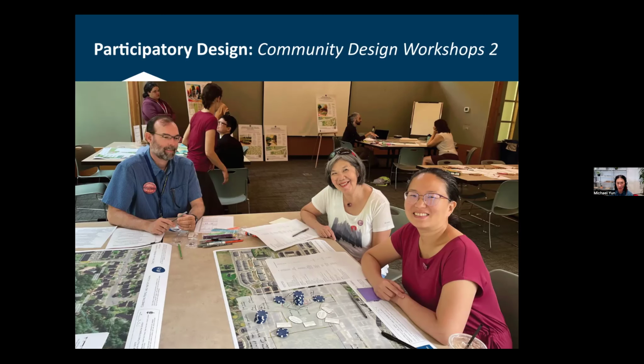This is Gary Keck with THPRD, and he was really instrumental in helping us understand their cost understanding for many of the different elements that we were proposing, for example, hard or soft surface trails and community gardens. We reviewed a lot of their recent projects with them to understand what they were spending on these elements, and then developed essentially a menu that covered all of the most common cost items in these ideas. And we brought those to these workshops.